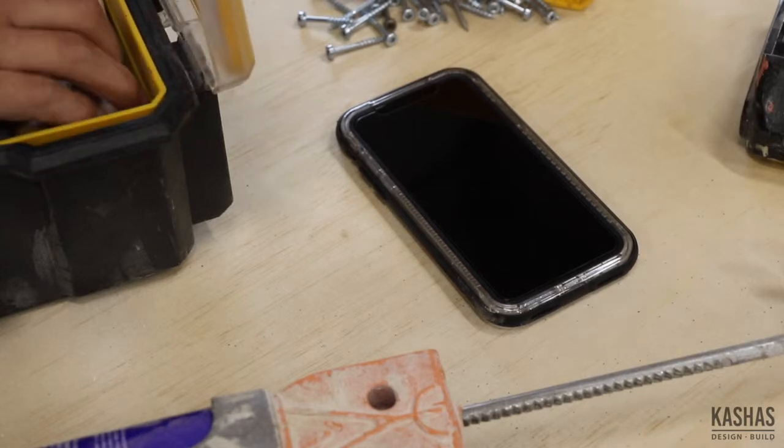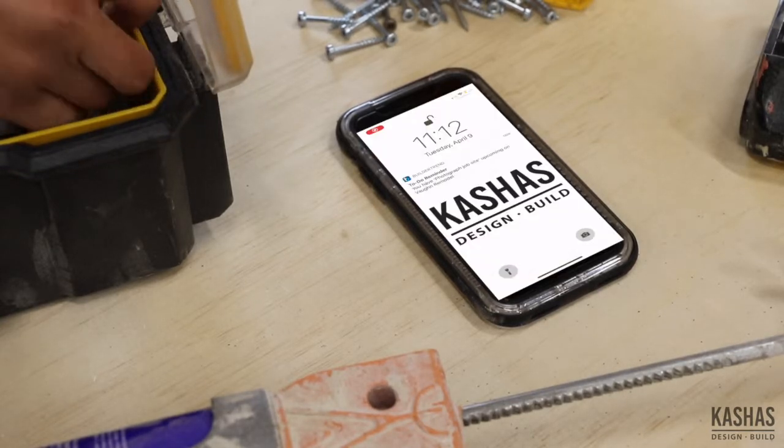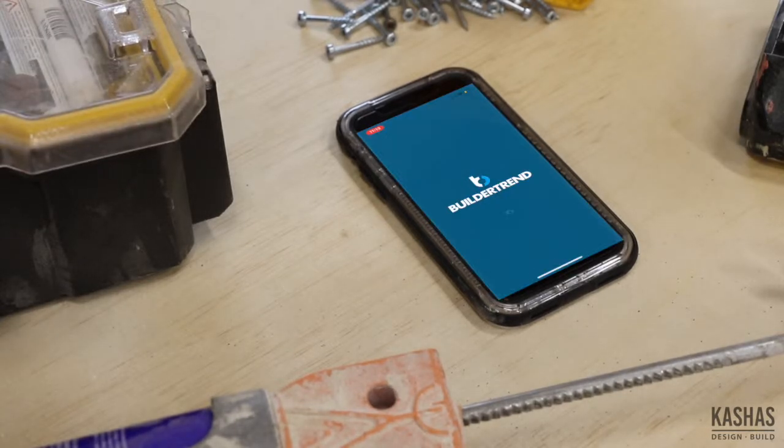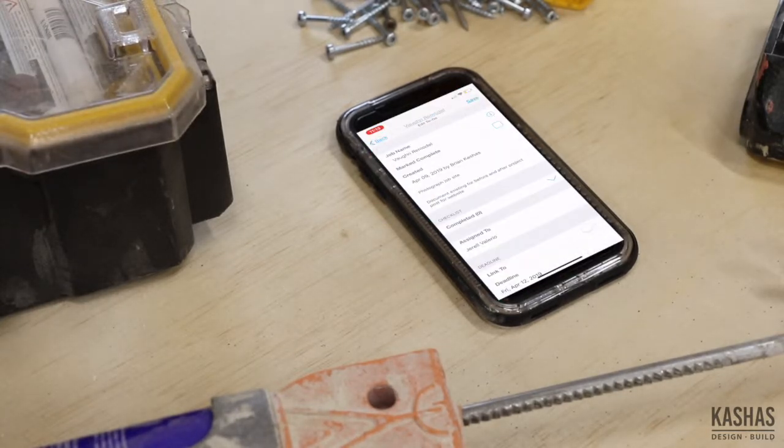Once we've listed out those tasks, we put them in order, we set a duration for each task, we identify dependencies such as this can't happen until that is done. Cool thing about Buildertrend is we can input that into the system, and it sends an alert out to the subcontractor or supplier. When something's been assigned to them, they click confirm, and now we know that they're on board with the timeline of the project, the duration that we've set aside for them to do the work, and we can rely on them to show up ready to roll on that date.